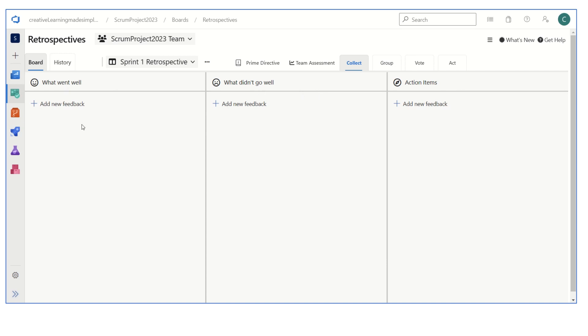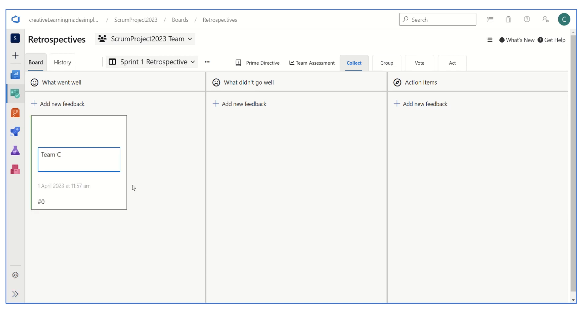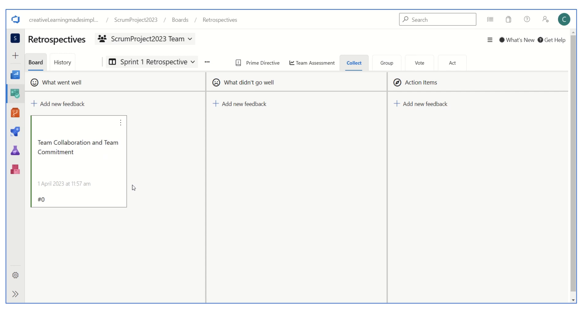When we are doing the retrospective with the team, we have to capture what each member mentions. They can add cards for what went well in our last sprint, what didn't go well, what are the items for improvement, and how we can improve those. If I'm one of the members, I can add a feedback like what went well. I can say yes, team collaboration and team commitment. I can simply click on enter.